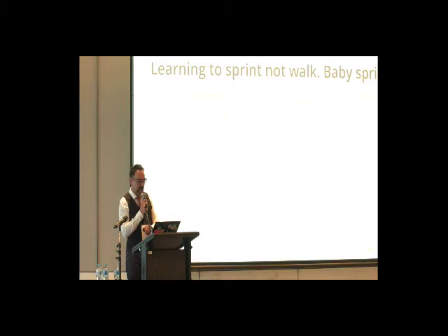Now this may sound familiar to some of you, but with our traditional waterfall style projects, we detailed the business requirements and exact budgets for the entire development phase just in order to put a bid. Now you may find this fairly familiar. It is just project A, you need X dollars to give you exactly Y output. And that was an expectation that the project board and business had.